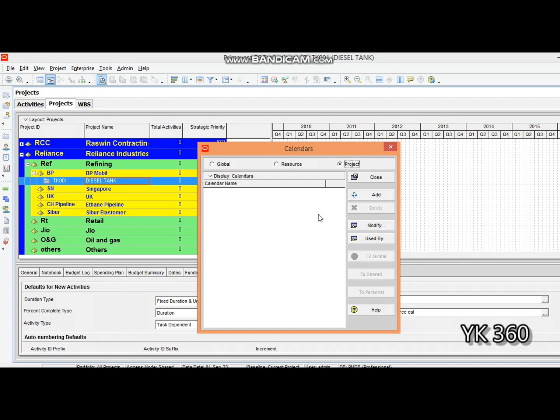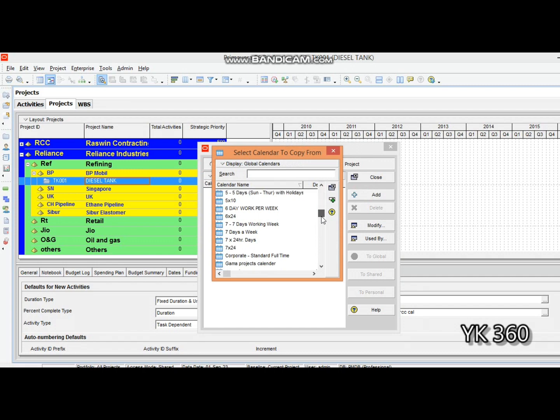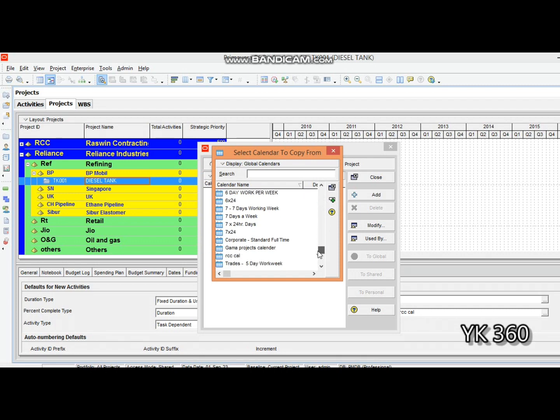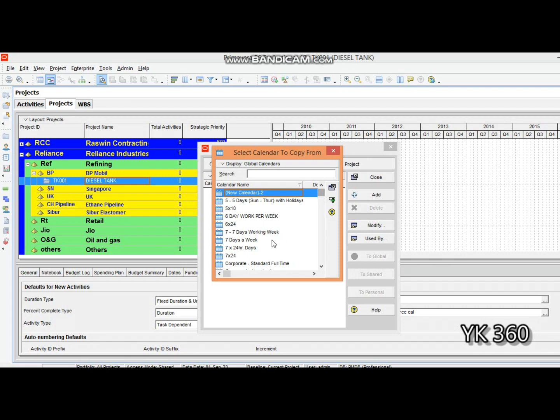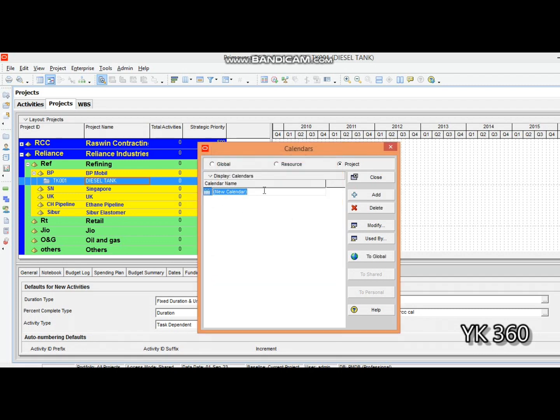Click the Add button in the calendar tab and a list of calendars will display the templates from the primary database. You can select which calendar you need. We are going to select the Seven Days a Week calendar since we're going to work all throughout the week for this tank construction. Just click on this and click the Select button, then rename it as CLTK001, Calendar for Tank 001. Now we have successfully created a calendar.